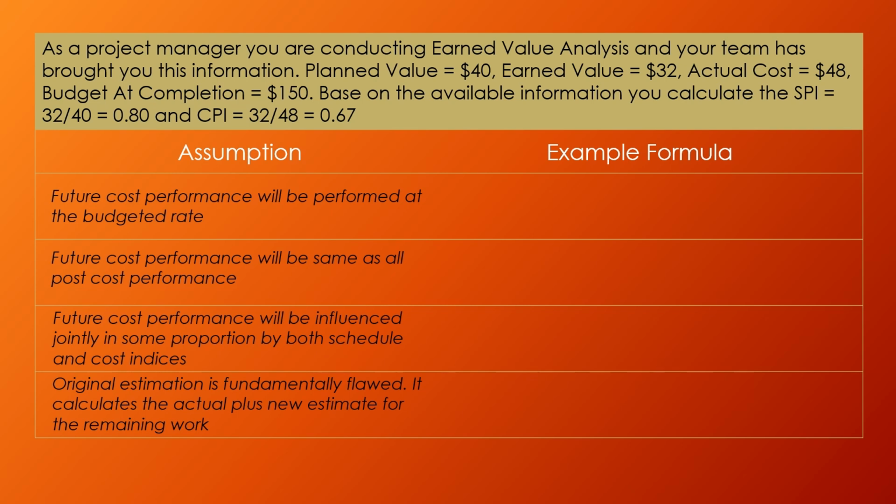As the name suggests, the budget at completion, or BAC, is the total money needed to execute a project successfully. To calculate BAC, tally up all your projected expenditures and spending. Budgets are usually divided into categories. The BAC is the aggregate of all of the individual categories.